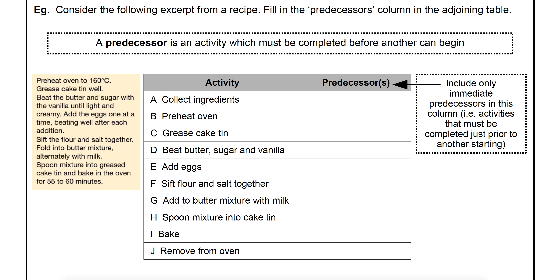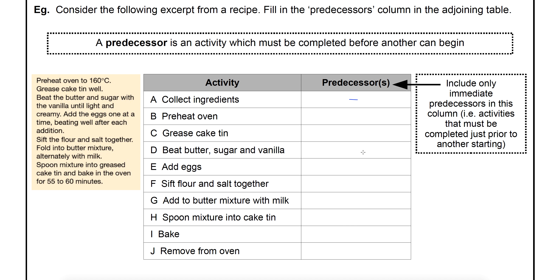The first one is collect ingredients. There's nothing from this list that needs to be done before you collect those ingredients, so there is no immediate predecessor. Likewise, preheating the oven — you don't need the ingredients to preheat the oven, so there's nothing that needs to be done before that step either. Most people would even preheat the oven first, and you'll see it listed first in the recipe before they collect their ingredients.